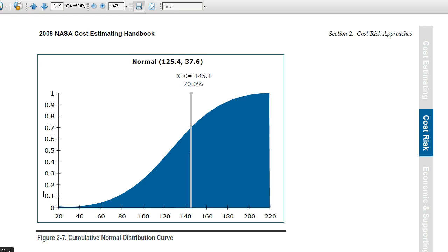I've done some things in the past where, based on all the estimates and the amount of uncertainty in each of the individual estimates, you come up with a cumulative way of getting to what the confidence interval in our estimates is, how much reserve we need to add — whether it's schedule or cost reserve for management.